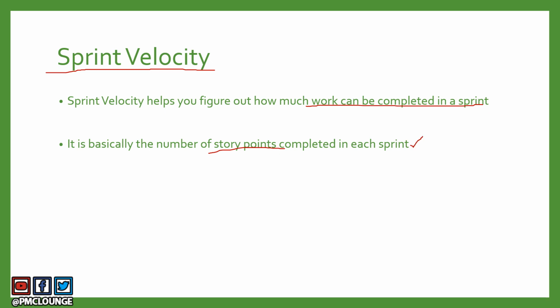Remember, we are talking about the number of story points. We are not talking about the number of user stories, because one user story may have 5 story points, and the other user story may have 2 story points. So we are not talking about the number of user stories here. We are talking about the number of story points.